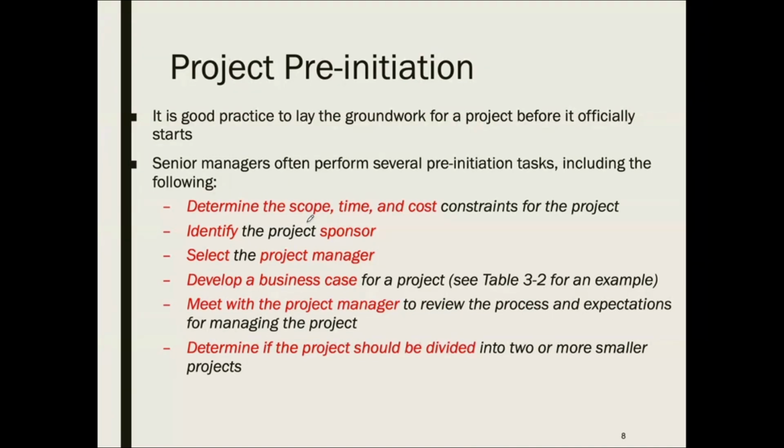Okay, and then at this stage, you might decide to divide the project into two smaller projects. Why do we go for full-fledged system development? Let us go for this part first as a pilot, or just to ensure that we don't have lots of things to do and we just track the project. So we start this part done, completed, then we can start another project.